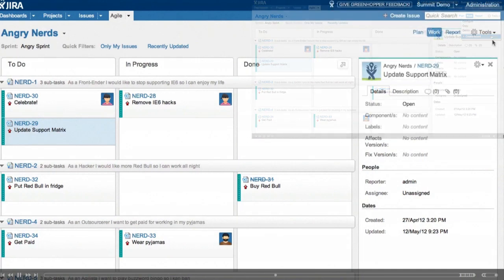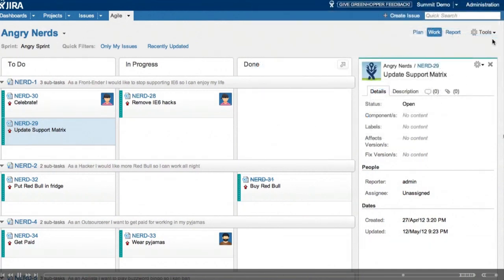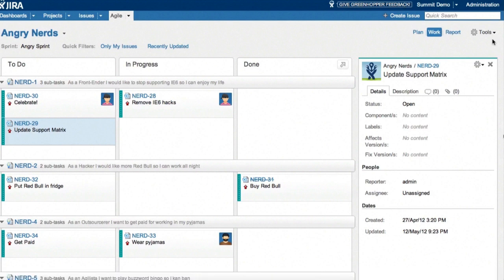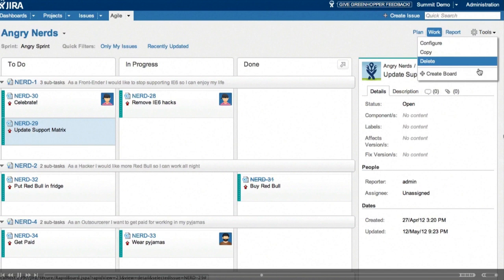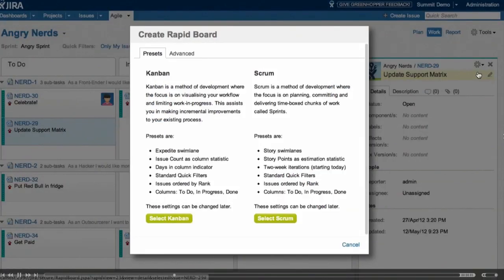So here we see the rapid board in full flight, but we're going to create a new one for our team. So just go to tools and create a new board. So we get some presets. We can choose Kanban and scrum.